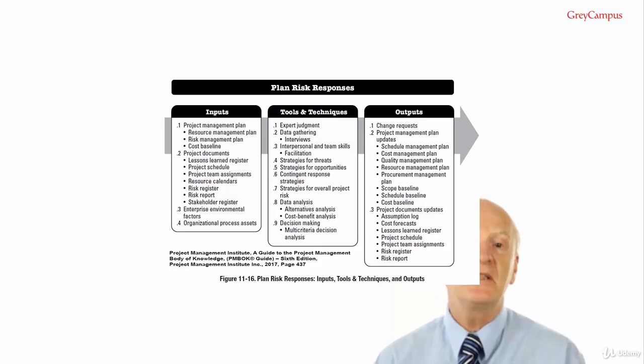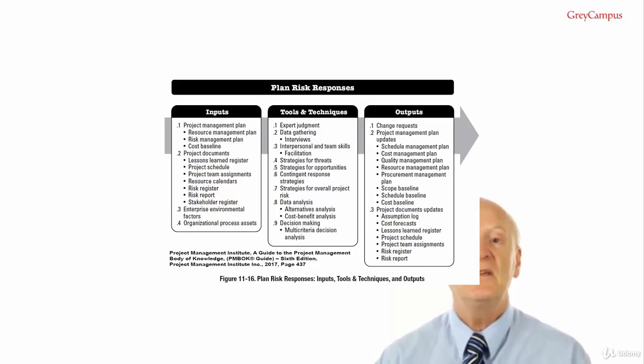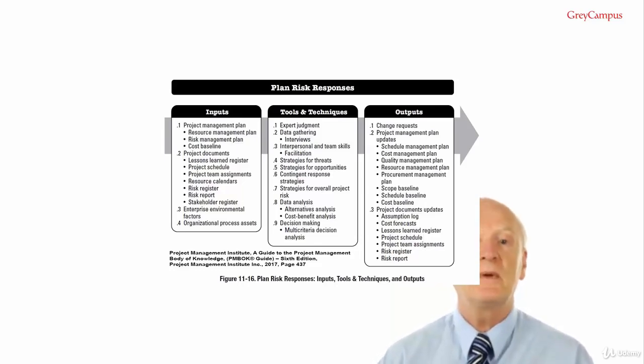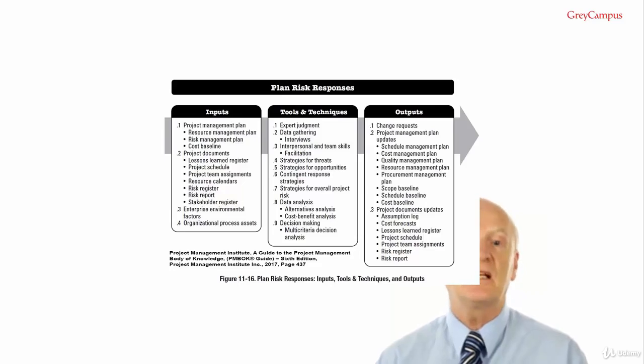Escalated risks are managed at the program level, portfolio level, or other relevant part of the organisation and not at the project level. The project manager determines who should be notified about the threat and communicates the details to that person in the organisation. This means that the risk owner must be at a level of authority to implement the response. Please note this for the exam too.